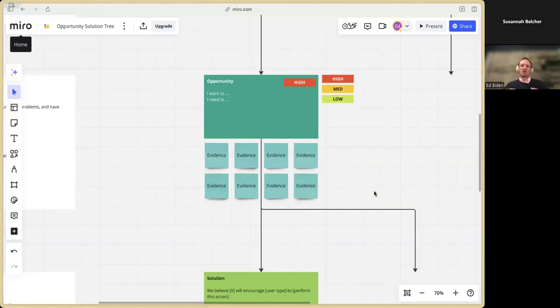So what I'd recommend is sketch this out at a high level, very quickly, and then do a kind of almost gut feel prioritization, or a prioritization of what you know right now. And then once you've narrowed it down to 2 or 3 things at each level, start to work those up in a bit more detail and be much more quantitative and much more evidence-based about whether you refine it down further. And then you're going to get the best of both worlds, where you're not going to boil the ocean with all your analysis, but you're going to be quantitative and data informed where it really counts.